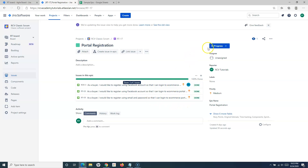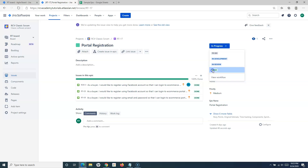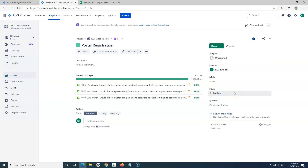When you customize the workflow, once all the issues are done the epic will be marked as done as well. But if your workflow doesn't support automatic closure of the epic once all child issues are completed, you can simply open the epic and change the status to done manually. In terms of process, you have to follow the closure of all issues within the epic first — done and accepted — and then mark the epic as done either manually or through workflow customization.